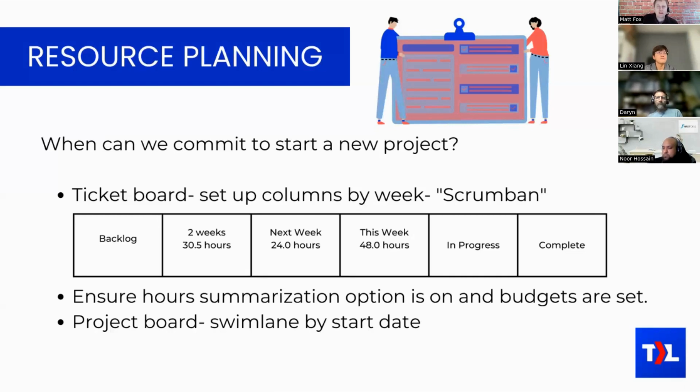So here's the benefit. Traditionally, this has been done with the calendar, right? So you have to choose the person to do a ticket, and then you've got to actually put it into the calendar. It's got to be on the right day. There's got to be a free block of the right size within that day, and you got to put it in there. And then if they don't get to that work at the right day at the right time, then you just got to reschedule it. That's the traditional way, and it's just a lot of work and it requires a lot of changes. So it's a lot of waste because sometimes you're scheduling things 2 or 3 or 4 times, even more sometimes.